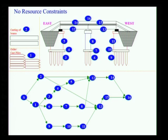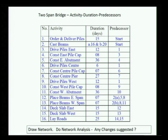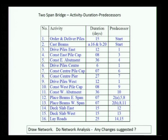We will take the durations as this, which we came up with in the last class and I had asked you to draw the network, do the analysis and see if there are any changes in how we go about the network analysis. If we actually go back to the bridge, remember this network is our base network and we develop this network based on what assumption? Right, it is written there, resources are all available. That is why we can do, for example, activities 3, 6 and 9 are only dependent on delivery of piles. That means I should have piling rigs at 3, 6 and 9 operating simultaneously.